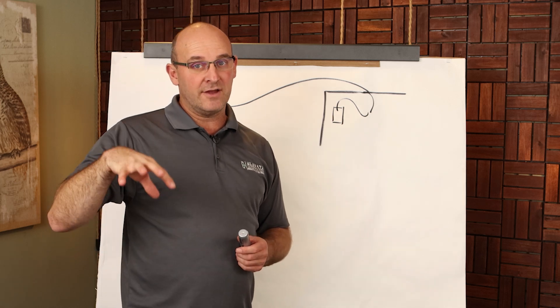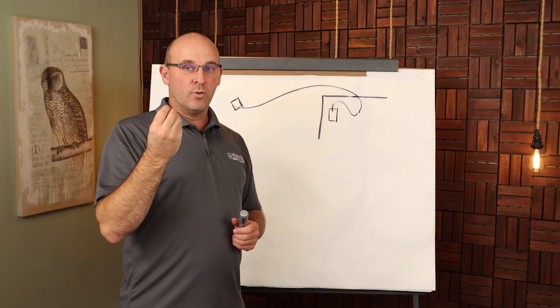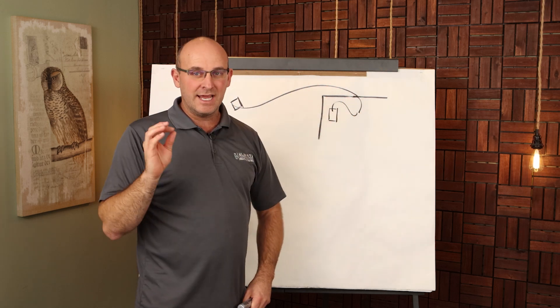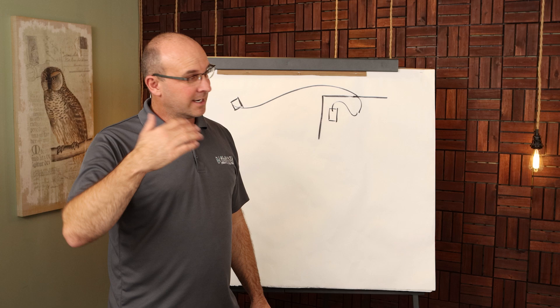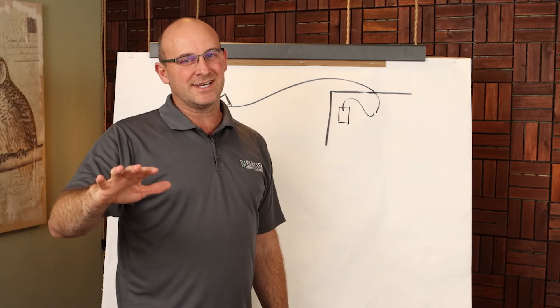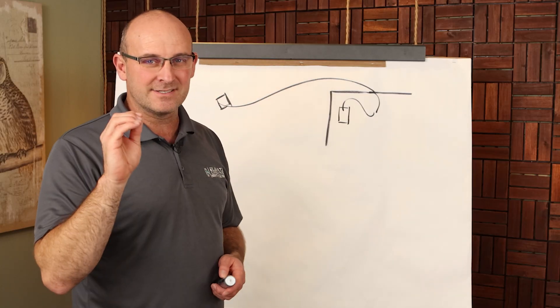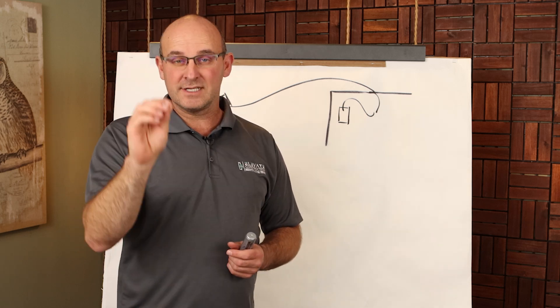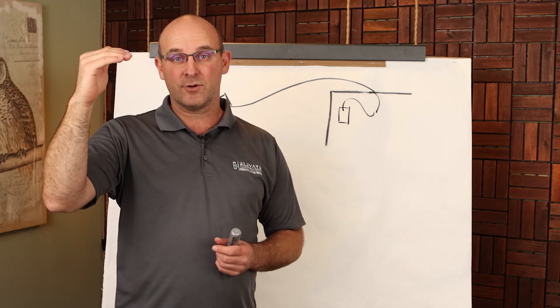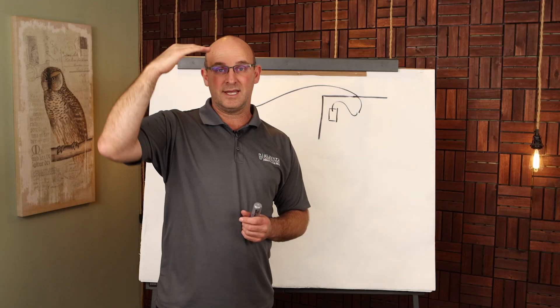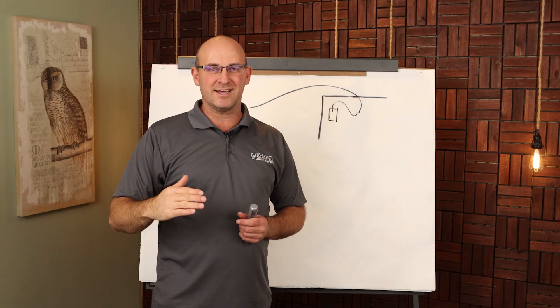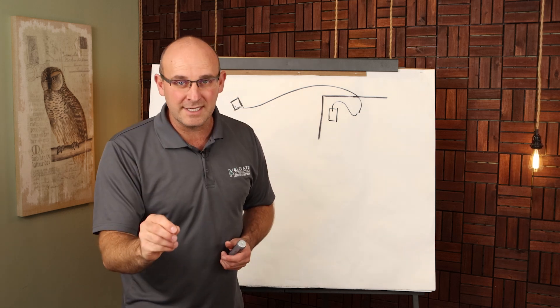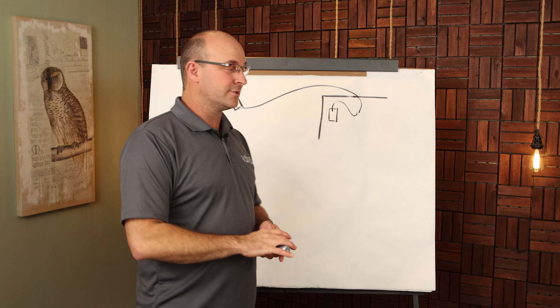Your basically your FE group overall planning. Once that's done, and I recommend that that be on a timeline, make sure that everybody is looking out ahead at least a week, but like I always say one to six weeks out ahead to make sure that we're planning properly. Then it's time for you as a field engineer to go list out your to-do list and to fill out your personal organization system, time block, which means that within the day from the time that you got started to the end, time block the key activities based on the overall plan. So don't start the day until it's finished on paper or in whatever app you're choosing to use.